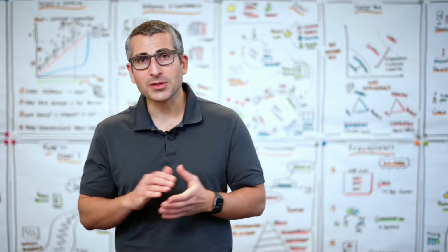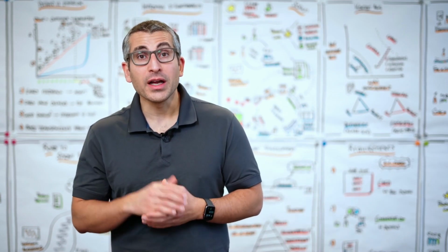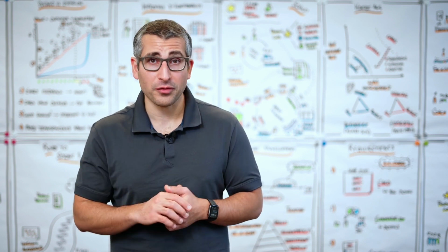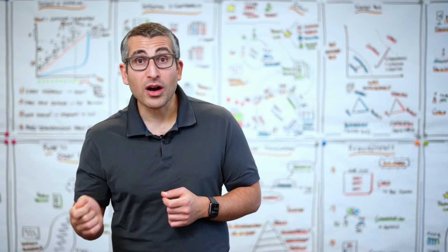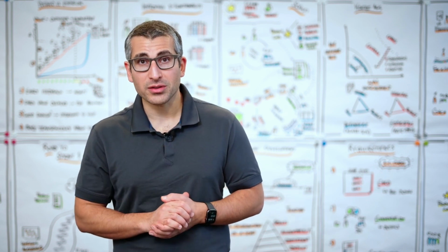Then, every great product backlog is a living document. Based on what we learned from our stakeholder interactions, we take new items in. We constantly refine that product backlog, which means we change the order, we break down items, but we also exclude items which we don't believe are going to add any value going forward. Last but not least, we want a product backlog to be estimated, at least the top part of it, so that a product owner can make projections with regards to the next sprint, with regards to the next release towards our stakeholders. Now we have a Scrum team, working agreements, a product goal, and a product backlog.